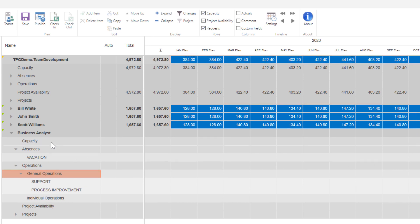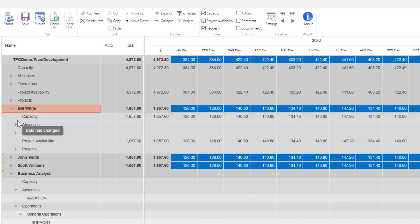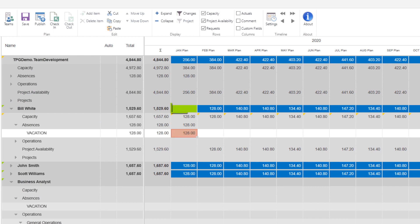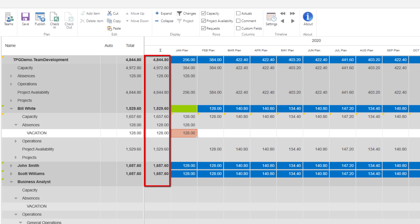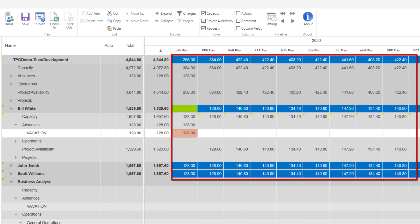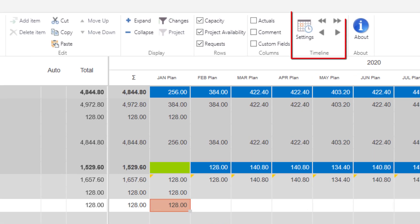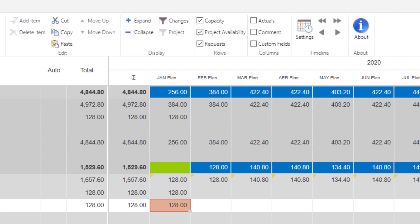The data is currently filled in with a blue background since we have not assigned any of the capacity yet. But as we get to the ideal of full utilization, the cells will be filled in green. For example, if we were to enter Bill White's January vacation, you will see the Summary go green because the summary of his absences and/or operations equal his capacity of 128 hours. Notice as well that when we enter data, the Team Manager updates columns such as the one containing the Sigma symbol, which summarizes the totals for the year, and there is also the Totals column for the entire row. The timescale can be adjusted using the timescale icons, and your resources, projects, absences, and operations can be ordered using the Move Up and Move Down buttons on the ribbon.